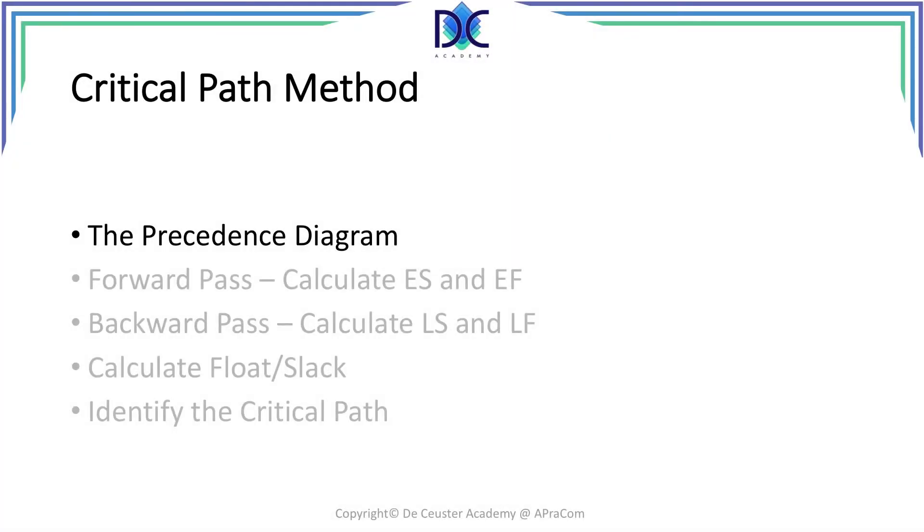So we understand how we have to make a precedence diagram and now we are going to introduce this precedence diagram in what we call the critical path method. The first step in the critical path method is the precedence diagram. The next steps of this method will be shown in the next sessions.